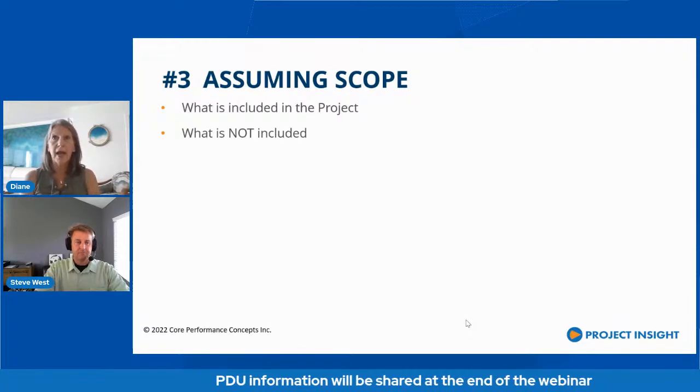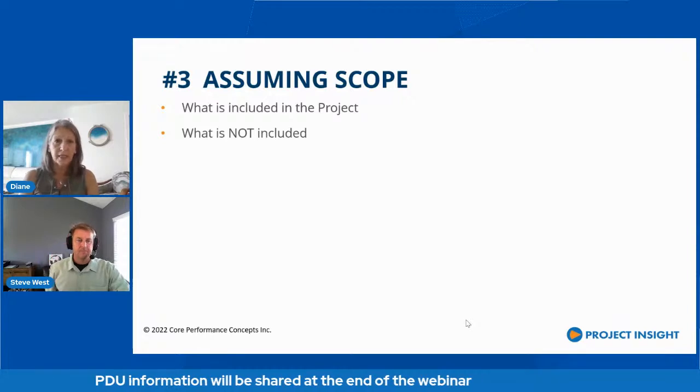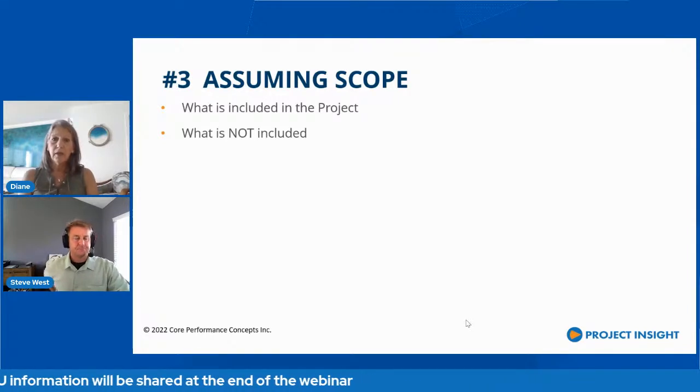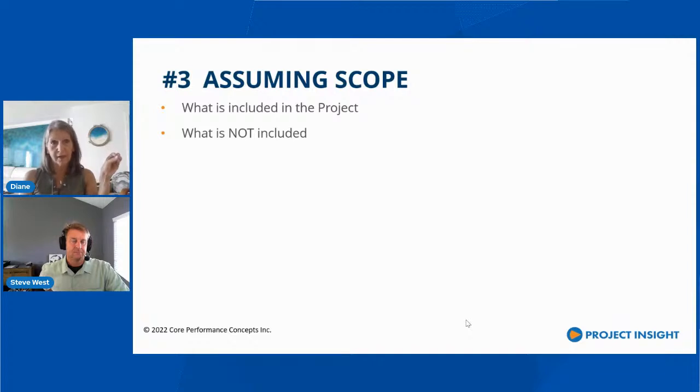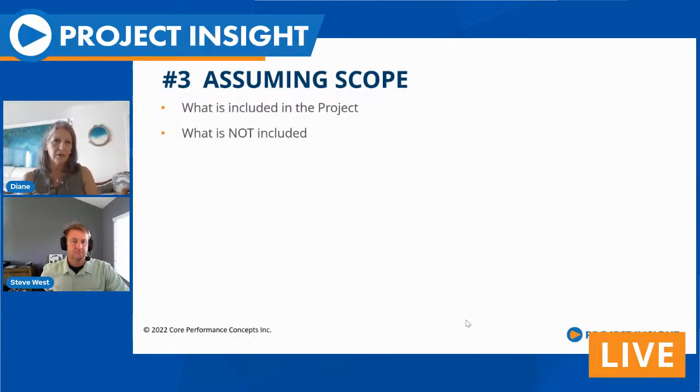So you might have 20 defects that come out. Well, 10 of the 20 are this one thing. So that's the one I want to tackle. It's the whole Pareto's law, 80-20 rule. Find the thing that's the most frequent, and the ones that are less frequent, you may not need to do anything with. Just let them be and not spend that time and energy. So not all issues that come up are created equal, in my opinion.